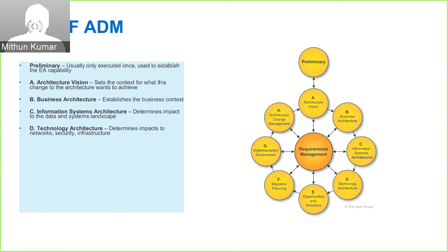A quick thing I remembered from my Univar days is that when we were doing the initial estimation, I remember Rajiv specifically mentioning that we are not taking care of the infrastructure for the Informatica stuff, because once you get into that, that is when we have to think about the technology architecture, and you definitely have to have a lot of involved time allocated for that, right, Shane? Yeah, absolutely. I learned that from a couple of estimations that I did for a few projects.